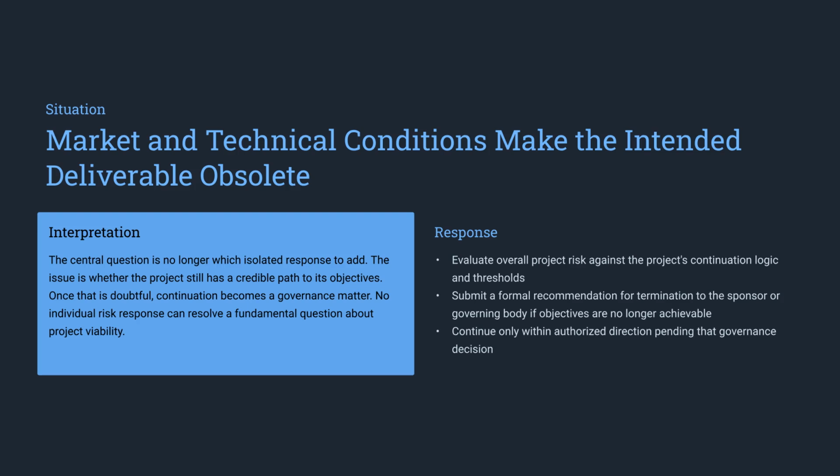If technical shifts make the final deliverable obsolete, this is no longer a simple risk. It is a fundamental question of viability. Submit a formal recommendation for termination if objectives are no longer achievable.